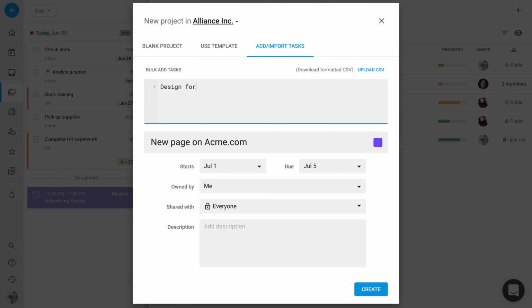I'm going to say design for 2 hours, and I'm going to assign that to Mara, just using @Mara. I'm going to say review for 30 minutes, and that one's going to be for me, so I can just leave myself out there. And I'm going to say add to website for 1 hour, and I'm going to assign this one to Jan. So you can see that the text turned blue, meaning that TimeHero picked up the duration and the assignees for these tasks. And I'm going to create this project.